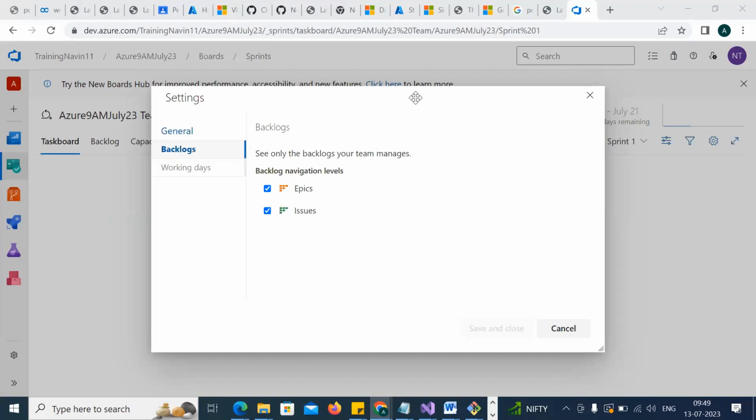Understand, please. Why is the issue there? This is not the current issue; the issue might happen. What happened is, I have realized that this is an issue. But I realize that this issue is not mandatory to fix in this sprint. We'll fix it in the next sprint. So in that case, it will go to the backlog. That's why issues come into the backlog. Not all predefined issues are there. Hopefully this will be clear, right?